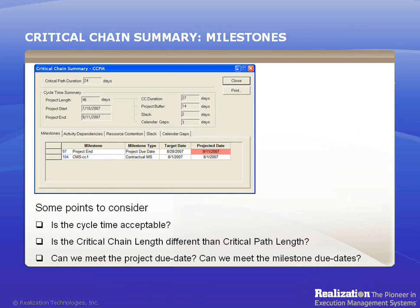If there are no contractual milestones, there'll be only one line for a project — the status of the project due date. If something shows up in red, it means your target finish date cannot be met. The purpose of the analysis will be to try to compress the schedule so the cycle time can be met. Remember, you won't know if you can meet a project due date until you've exhausted all possibilities for fine tuning the project, such as eliminating resource contention, slack, calendar gap, and done aggressive duration estimation with cycle time reduction across the board.